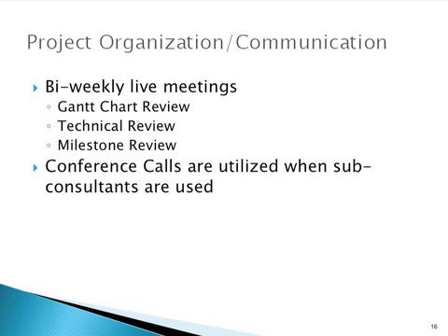For the project communication aspect, since we are relatively small, we do utilize live meetings where we review the Gantt chart, any sort of technical specifications, or review any sort of milestones that we might have hit. Additionally, when we utilize sub-consultants, we do use conference calls or email. This concludes the project organization and project communication.